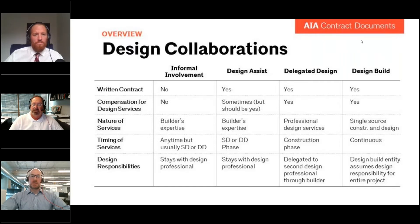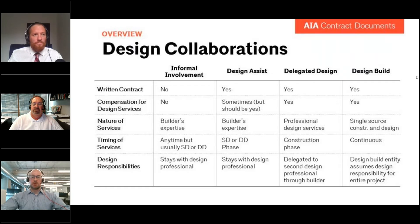Beyond establishing common terminology, once we got into what an agreement for design assist or delegated design actually looks like, we looked at how the information being provided is used on the project and how it needs to be tied into all the other agreements that define the process. For instance, if there is a governing prime agreement, are there provisions of that which should apply to companies providing those services? There were things like intellectual property rights that needed to be addressed, and also BIM documents — if you don't have an agreement, there's really no way to make those exhibits binding.